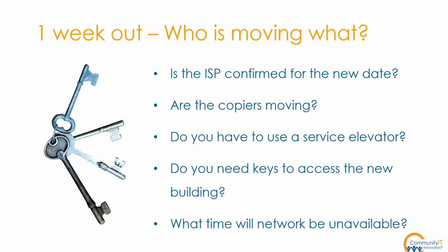And so at this point, we're going through our checklist to make sure we have everything we need. Is the ISP confirmed for the new space and the new time? Ideally, we like it to overlap, so we have the internet up in the new space before we move in. So the IT vendor or tech expert can go in and check and make sure it's working fine, and you have plenty of time to resolve any internet issues.